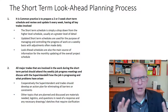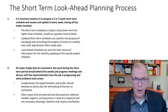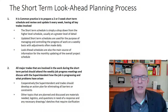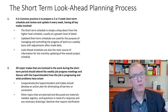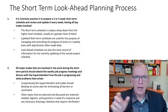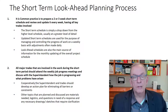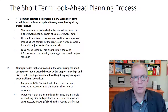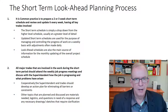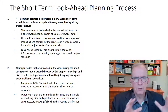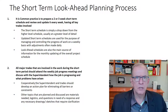That's some of the weak points under the traditional method. Where it's done well, the superintendent isn't hitting them on the head with a hammer saying you've got to get this done — they're asking questions. We've talked about the five whys in previous lectures: why can't you get it done? Really getting down to the root cause, and if it's something the site superintendent can do to alleviate that problem, they can work at removing those obstacles and bottlenecks. So it takes on a more collaborative engagement, and that's where really good site superintendents working collaboratively with the PM and trade partners are reasonably successful using those methods.